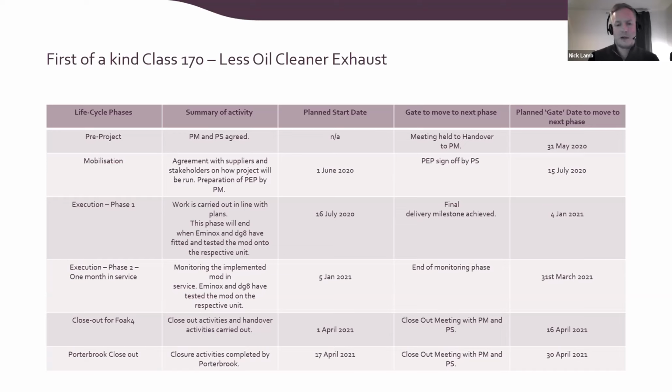This was due to some of the minor issues that we'll discuss later on. COVID affected the availability of the units to East Midlands Railway as they were being cascaded down. The timescales were very challenging on the design to start with. The lead times in getting some of the equipment and the installation were large. So we set ourselves a challenging environment, which ultimately, no spoiler, managed to be a great success.